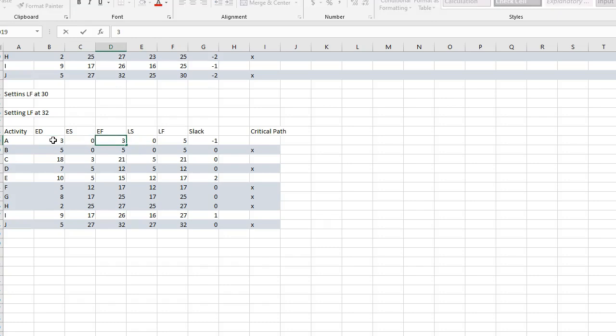So all we're doing from that early start to early finish is we're looking at things from left to right. The late start to late finish, we're looking at them from, so left to right on early start, and then right to left. In other words, backwards of the way we normally think when we're doing that late start, late finish. So this says, how early can I get done? And this says, how late can I start? So hopefully that helps and makes some sense when you're starting to put those together.